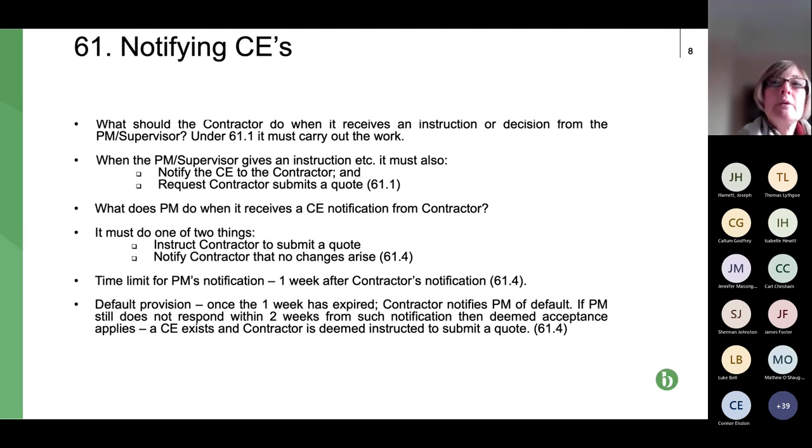And obviously, if agreement can't be reached on those processes, it looks like, as a contractor or subcontractor, that the issue might be going to adjudication. Quite often what you find is that project managers are not agreeing on things as they go along, but their intention is to try and negotiate a resolution at the end, which isn't in the ethos of NEC. NEC is all about sorting issues out now, so the employer or client has some certainty, but that's often not how it works, which is why we started off with the slide about this potentially being one of the most problematic areas of NEC.